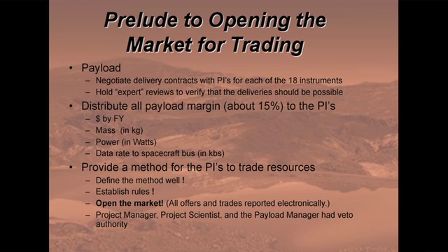The project manager, myself, and the payload manager had veto authority because we were a little bit worried what was going to go on here. Someone might figure out how to game the system. Well, fortunately, that didn't happen. Neither the project manager nor myself ever had to exercise a veto. The payload manager had one that he exercised on the basis of a problem with configuration. Too much change in the spacecraft center of gravity and so forth. But then that got worked out, and a modification of that trade went through.